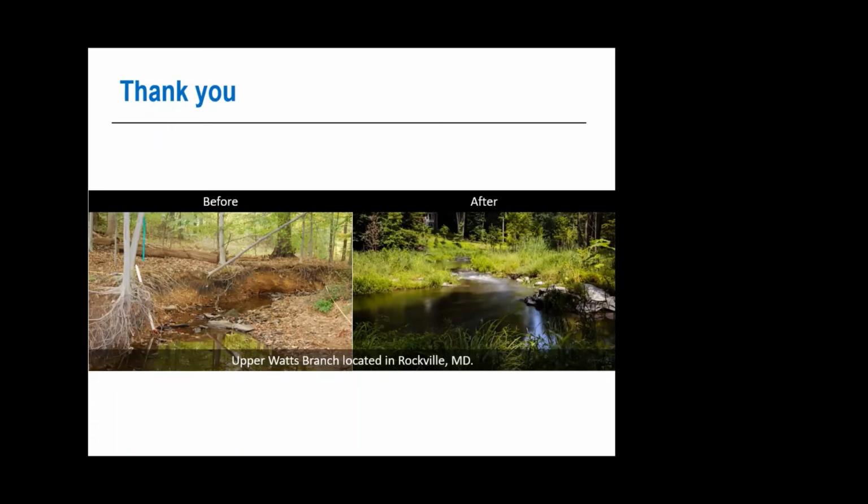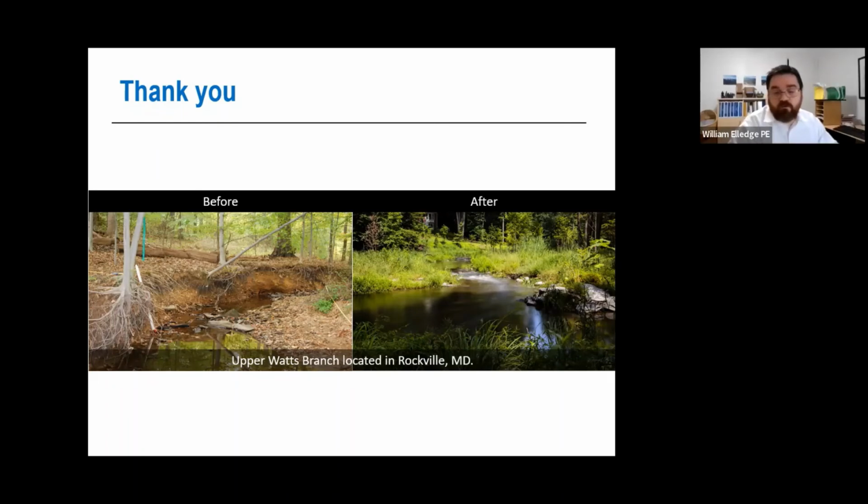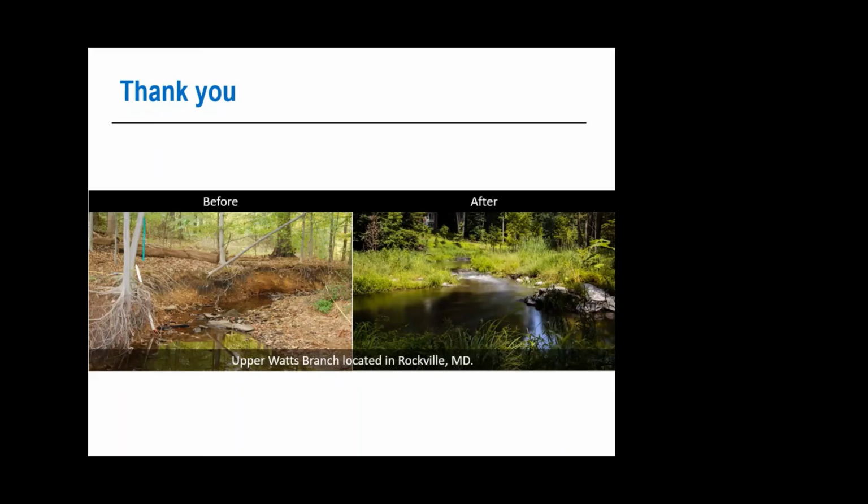Is that pre-construction or post-construction? It's all post-construction. The base flood elevation will be changing. The 100-year flood elevation in the park will be changing. That's why we have that CLOMR, and after construction we'll be doing the LOMR. Right. The letter for others who aren't as familiar, LOMR, Letter of Map Revision. Right. And CLOMR, as conditional.